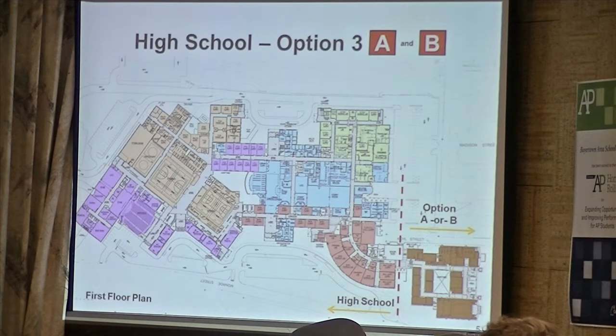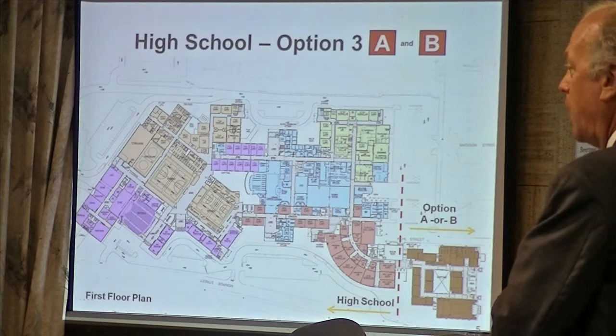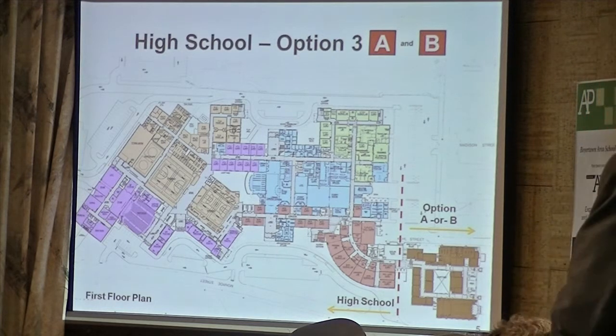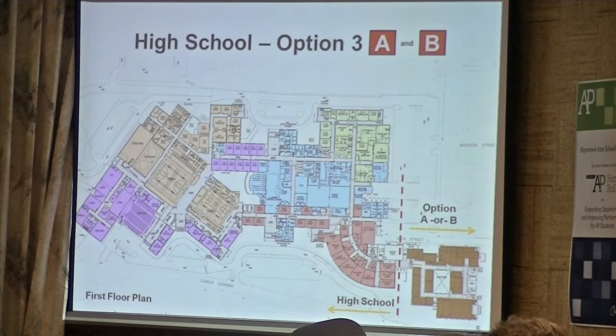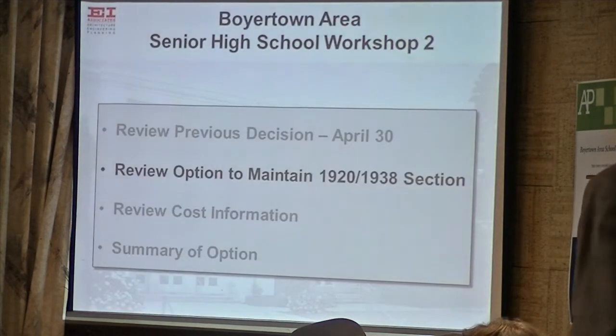Now, if this building is renovated and is also a LEED project, then this imaginary line disappears, and then you can share utilities if this is renovated as a LEED project. So, that makes just another complication in what you do with this building.